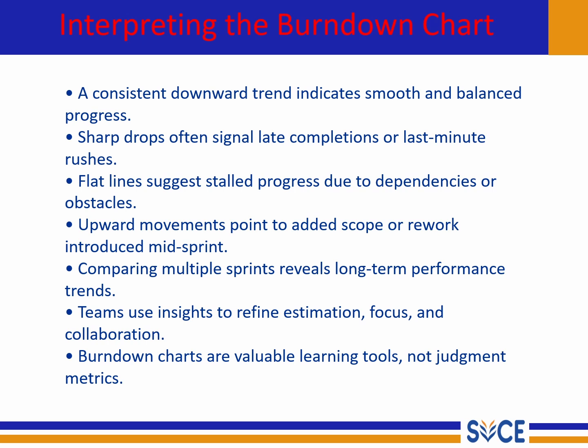But if you notice sharp drops near the end of the chart, that usually means the work got completed in a rush. Maybe most tasks were finished right before the sprint ended. It could point to issues like poor task breakdown or last minute pressure.